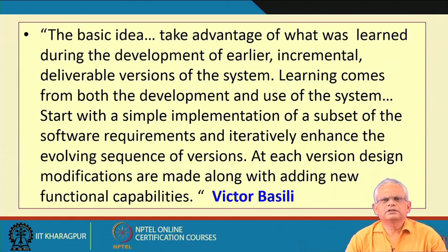In iteration, the same functionality is refined each time the customer gives new feedback, the same functionality gets refined iteratively, and also at the same time new functionalities are also implemented. These are called increments. So, this model is called incremental model with iteration.